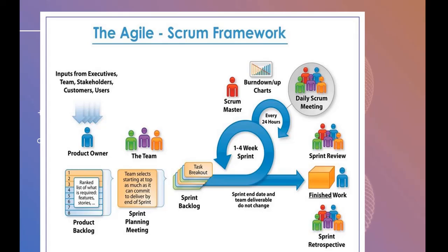So is this a good planning? No, it's not a good planning. As a Scrum Master, question once again. For example, the team velocity is 20 points per sprint. When they start planning, they took 30 points from the product backlog. 30 points means 30 points' worth of work.